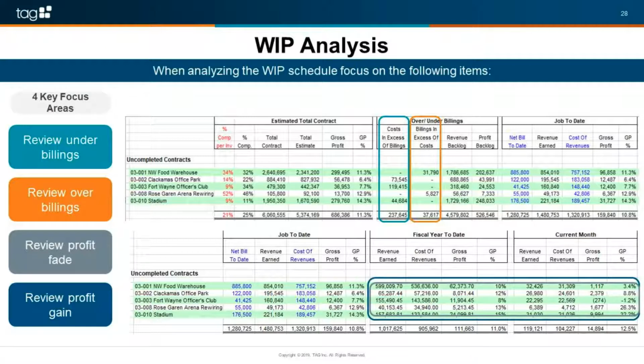So it's better to have a good balance between your over and under billings. Under billings can also warn you of potential problems. One, it could be you haven't billed on the job, so it truly is underbilled, right? So why wasn't the project billed this month or this quarter or whatever it might be? Okay, or was it submitted late and therefore we weren't able to bill?